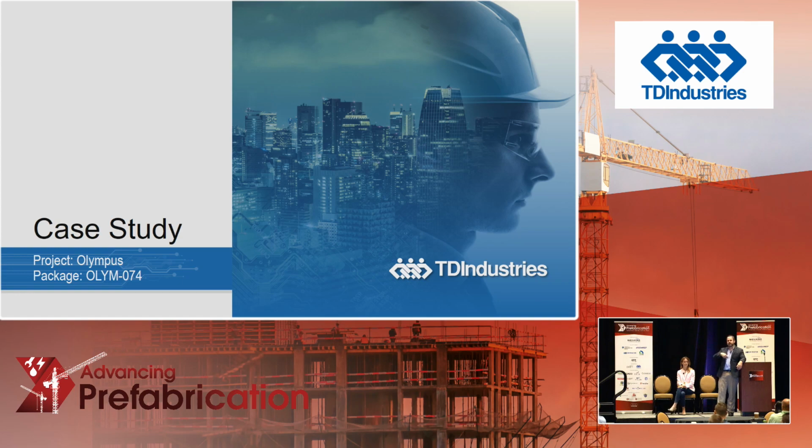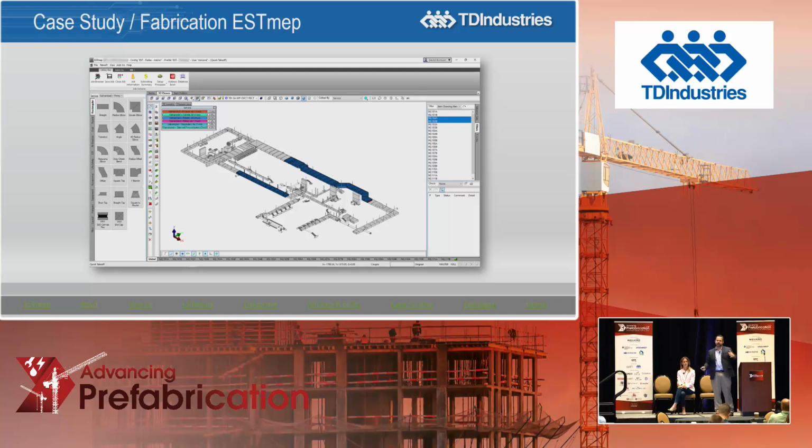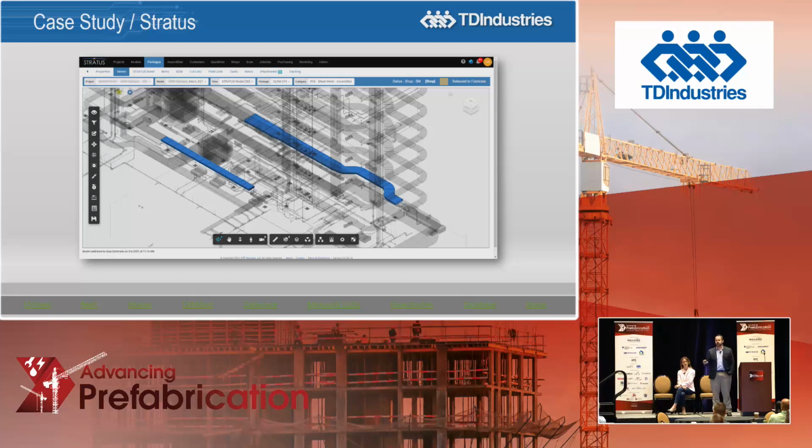So I went all the way back to VDC, and I got that same group of parts out of the VDC model, or out of the pre-con model, out of SMEP. You'll see it highlighted there in blue. Then I went to Revit, and I got that same group of parts. And I went to Stratus, same group of parts, okay? And I wanted to do some data analysis to say, well, what did pre-con say this should cost? What did it actually cost?